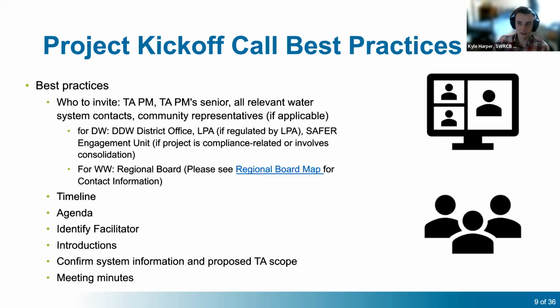And then to jump a bit more into kickoff calls, who to invite to kickoff calls. This list is actually pretty similar to the list of people that the assignment email goes out to. I'll just go over it again. The following contacts should be invited to the kickoff call: the TA project manager, the TA project manager senior, all the water system contacts, and all the community representatives.